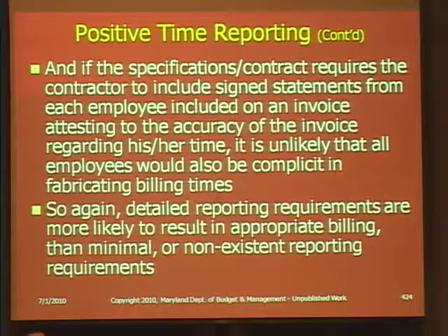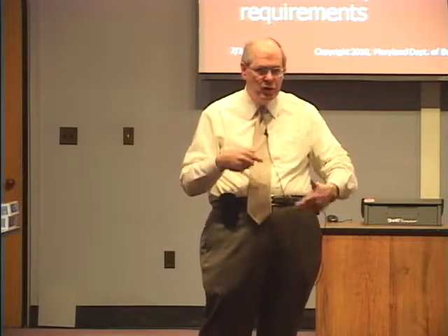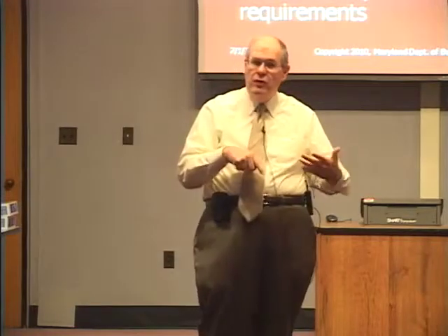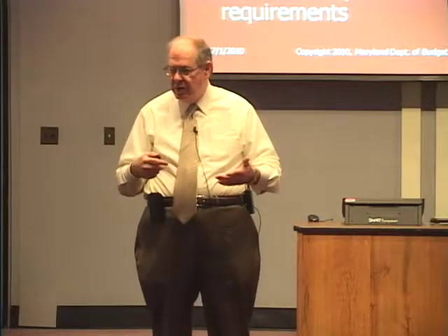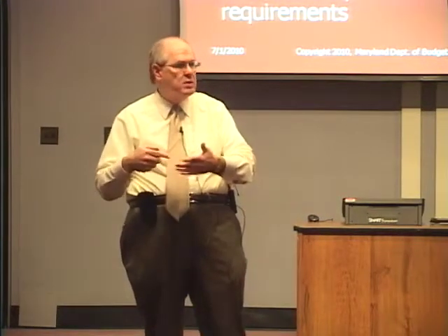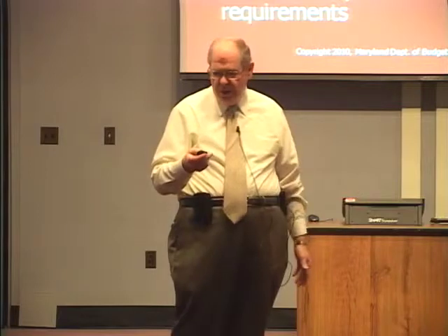and this is another level, and this is an even more likely issue where you're not going to get fraudulent billing. If you require that each of the employees listed on the invoice as doing the work for a given time, for a given purpose, needs to sign and have a signed affidavit, so to speak, that yes, they did work on the state contract on these different days, at these different times, and did this work, and I'm signing my name, there's far less likelihood that every employee of the vendor is going to deliberately fabricate their times and sign an affidavit, so to speak, that they worked when they didn't. So that's another level of possible validation.